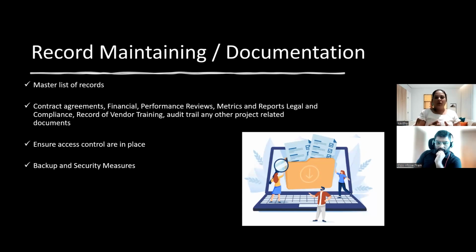And any other project-related documents. It might be a small document, but ensure you archive all the documents. If the project is completed, it will be in your quick catch, and you should put it in the archive and mention the timeline also. Discuss the timeline with the management and then archive the documents. Once a project is completed and documents are archived, you can't just say done. You need to ensure backup and security measures also.